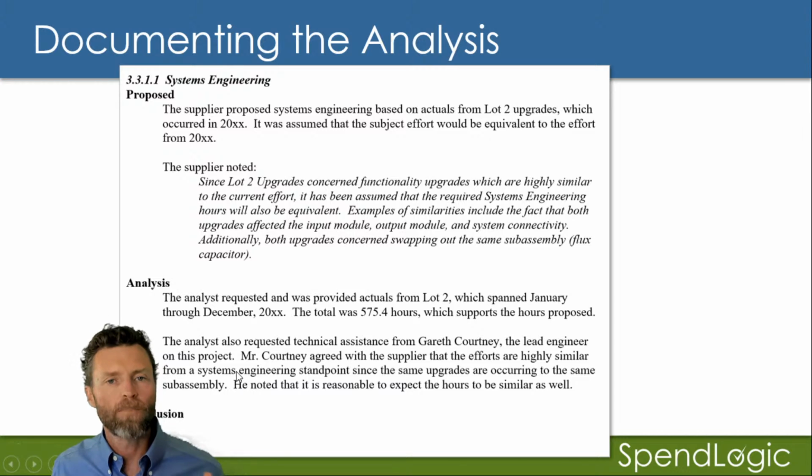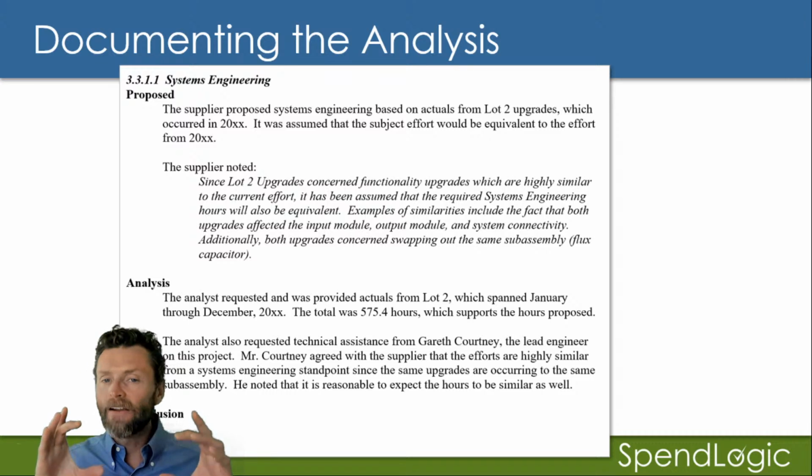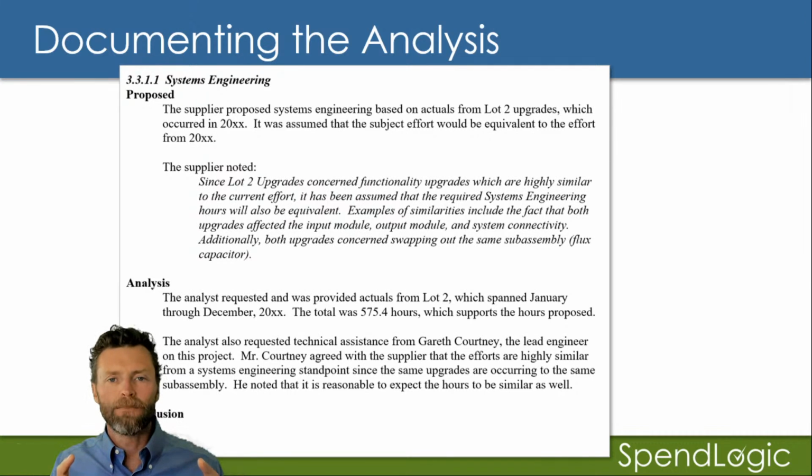And then it talks about what process Mr. Courtney went through. So in this case, he reviewed the efforts and agreed they're highly similar, and here's why. Since the same upgrades are occurring to the same subassembly, he noted that it's reasonable to expect the hours to be similar as well. This is a very buttoned up example and very succinct.